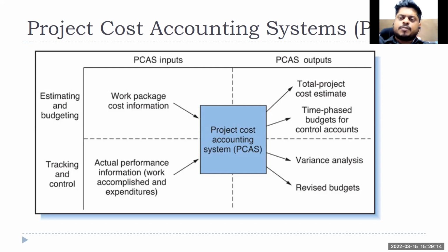When a vendor payment happens, it will be put into your project cost if it is part of your project. The only thing you have to ensure is that something which is not part of your project is not being charged to your account. Otherwise, what will happen? Sometimes costs which should not be charged to your account are put in your account, and your project gets charged, right? So that is the benefit of the project cost accounting system.